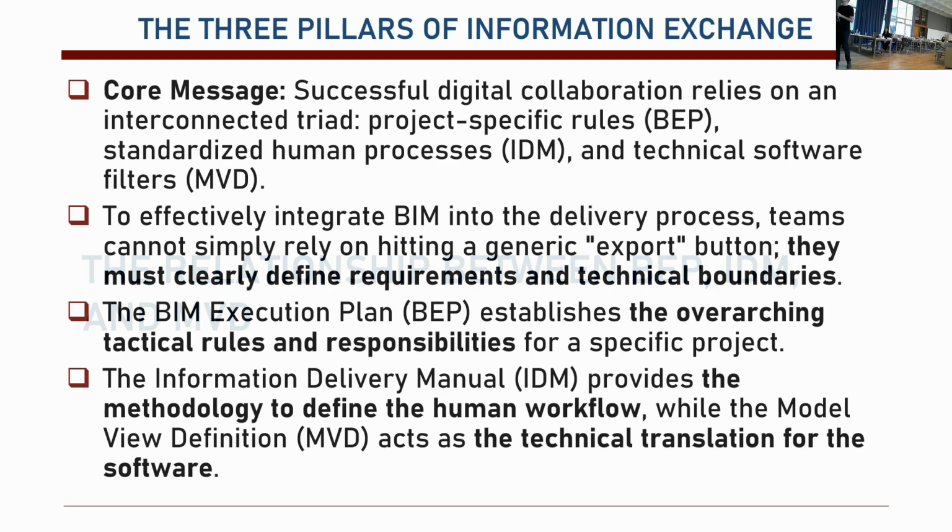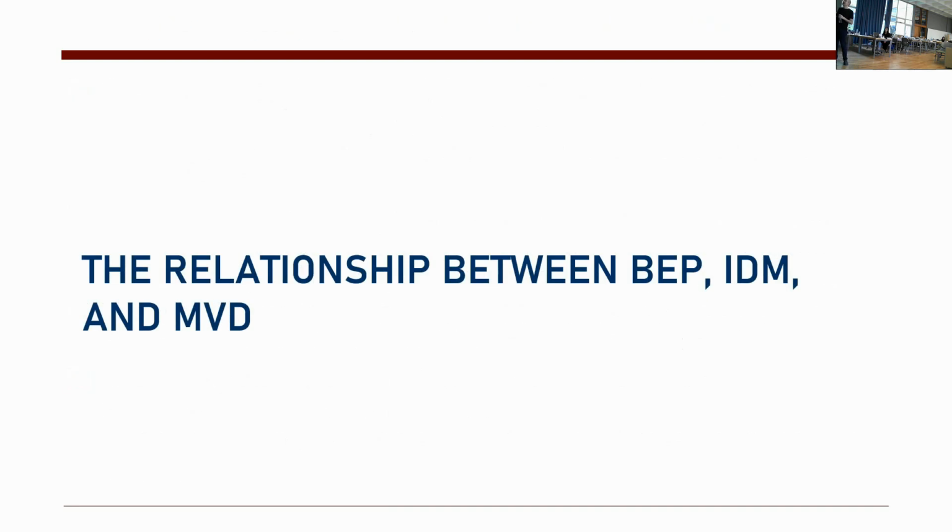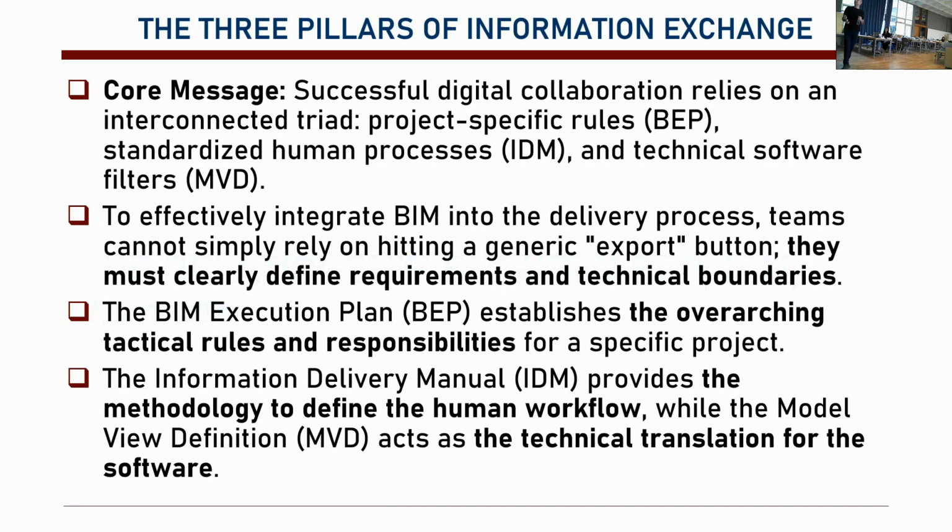So what's the relationship between BEP, IDM, and MVD? We want to have this interconnected thing. We have to have project-specific rules with the BEP. Then we have standardized human processes, information delivery manuals, IDMs, so we know what we need to do for whom, etc. Then we have the technical software filters.